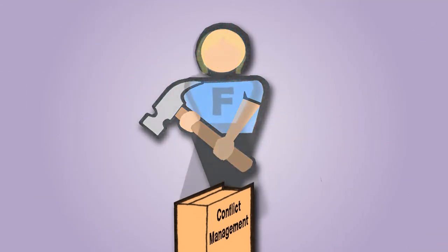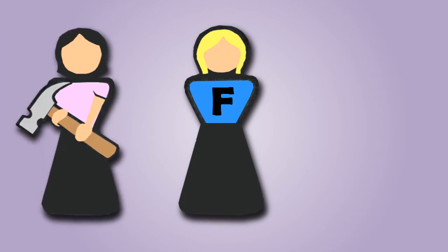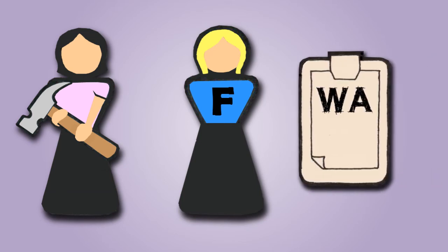Most companies operate under a functional organizational structure, and the functional managers usually have the resources and skill sets to complete the project within their own departments. When dealing with multiple departments, the project manager has to work with the functional managers to provide direction to the various functional units about their individual contributions towards the successful completion of the project. This written direction, called the work authorization, provides the functional manager with the scope of their contribution, the project schedule, and any budget information they need to know.